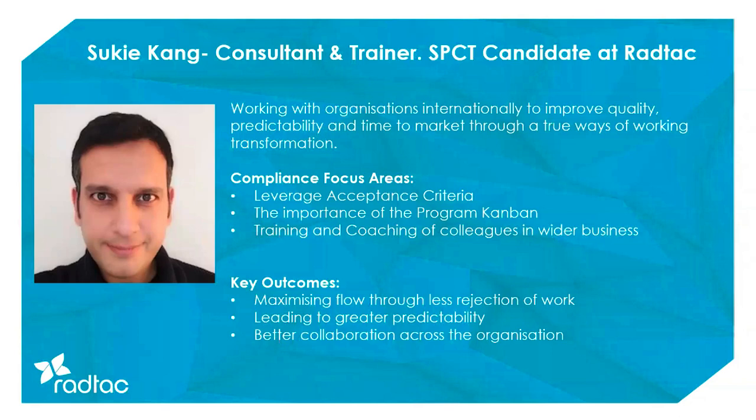A definition of done appears at different levels. Obviously, you have a team definition of done, which is a common understanding of what we mean when we say this story is done. Common understanding, so there's no ambiguity. We may also have a system level definition of done, or a release level definition of done, perhaps also one at solution level if you're in a solution train.